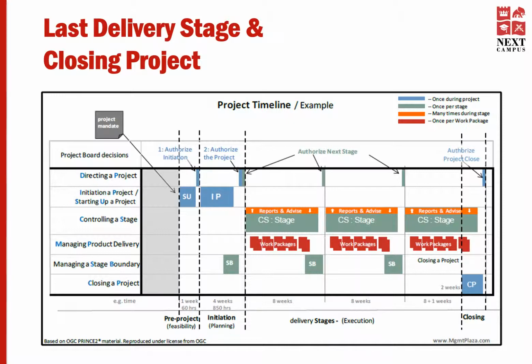The last thing that the project manager will do in the closing a project process is to recommend project closure to the project board. You can see it is not the project manager that closes the project. Again, we say that the project manager prepares the project for closure.